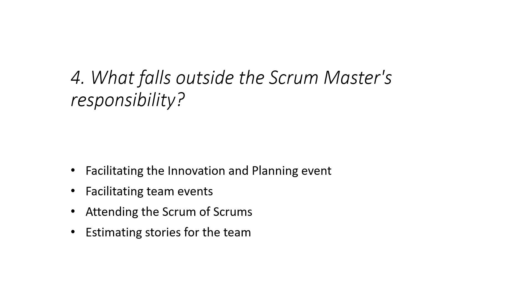What falls outside the Scrum Master's responsibility? The options are: facilitating the innovation and planning event, facilitating team events, attending the Scrum of Scrums, and estimating stories for the team. Facilitating is clearly a Scrum Master responsibility, and attending the Scrum of Scrums is also a Scrum Master responsibility. The right answer is estimating stories for the team — the team itself estimates stories, not the Scrum Master.